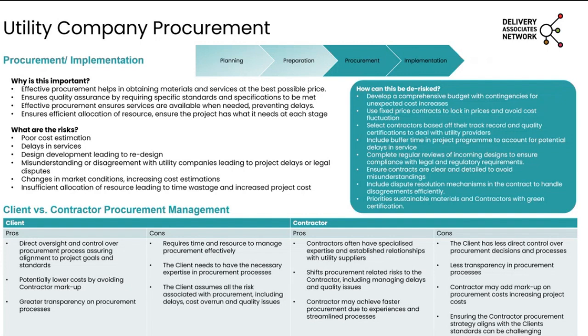Also, there's sometimes a misunderstanding by utility companies of what's required in terms of our design. They will come back with designs that maybe aren't integrated into the wider scheme design. So it's making sure there's time in the project to review their designs when they're received and make sure it's integrated into the wider design. Also to challenge it as well.